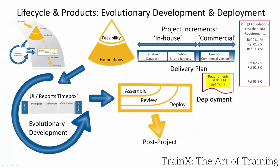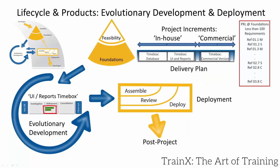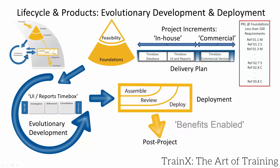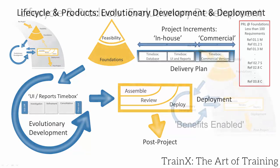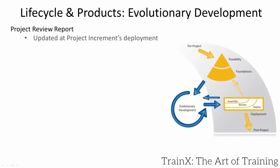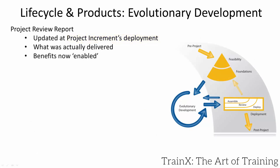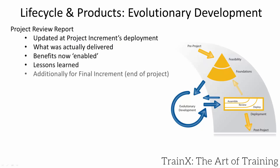Our final project increment — the commercial version — is developed and deployed as the last solution increment. During the deployment phase, assemble encompasses the work to bring together what is to be released. A review informs the final decision to release the solution into operational use. Deploy is the act of putting the release into operational use, enabling the potential benefits of the solution — at this point any plans for business change will be enacted. The project review report is updated to summarise the project, state what has been delivered, the benefits enabled, and any lessons learned.